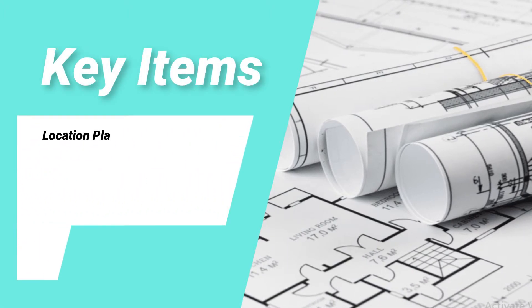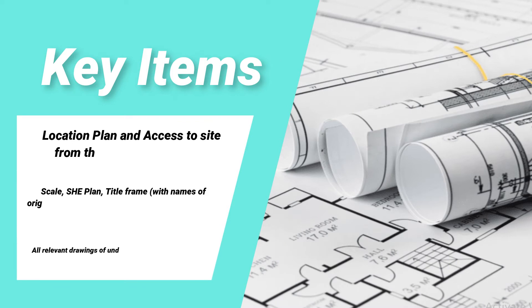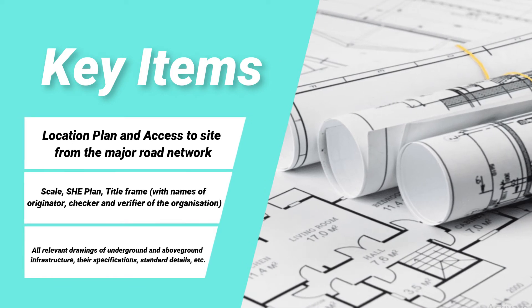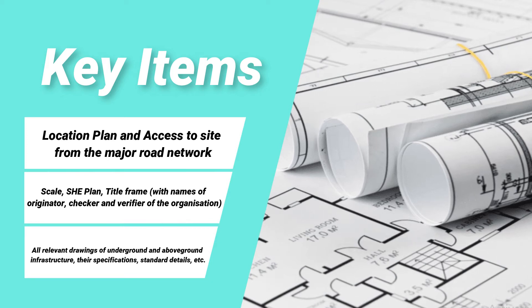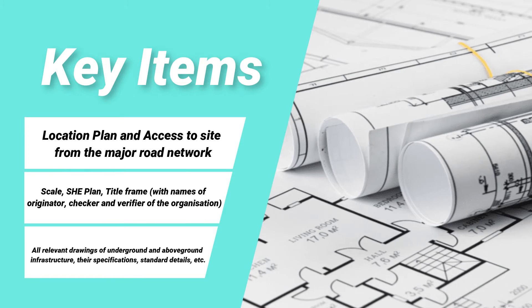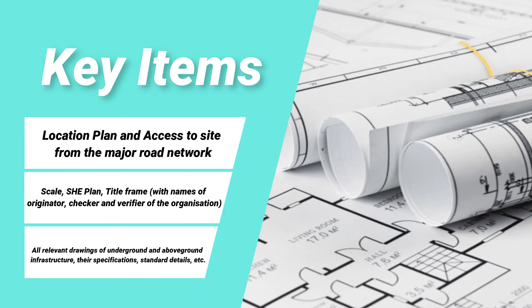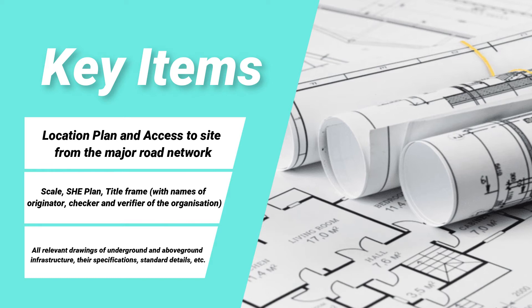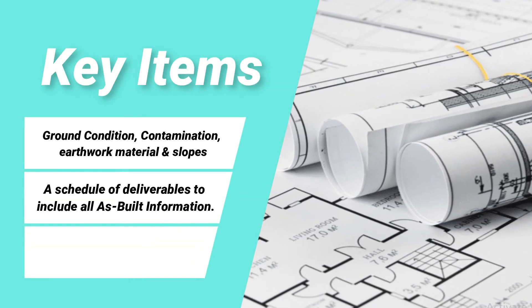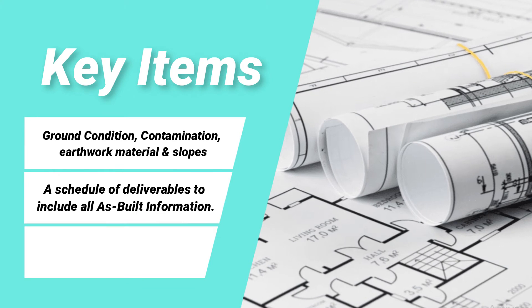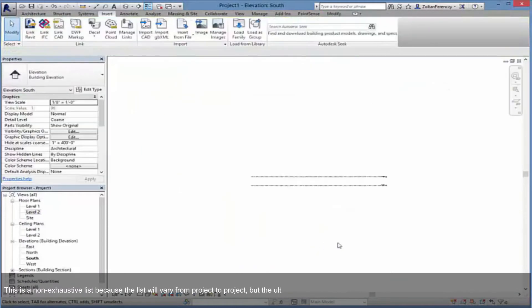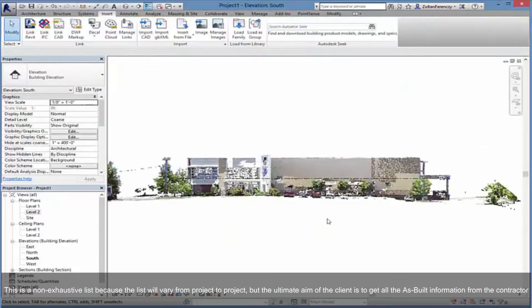The following are the key items recommended to include within the as-built package: a location plan and access to site from the major road network; a scale SHE plan; a title frame with names of the originator, checker and verifier of the organization; all relevant drawings of underground and above-ground infrastructure, their specifications and standard details; ground condition, contamination, earthwork material and slopes; and a schedule of deliverables to include all as-built information.